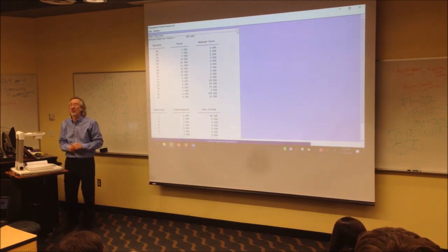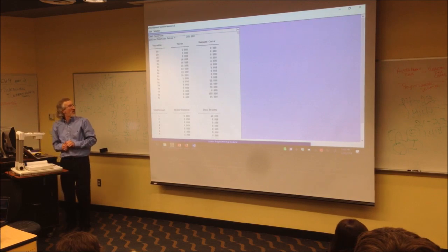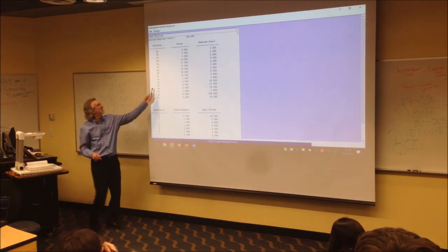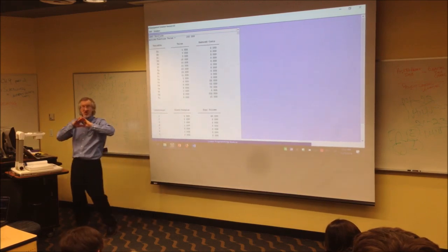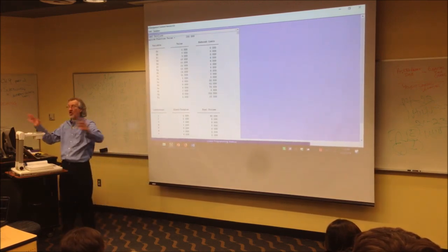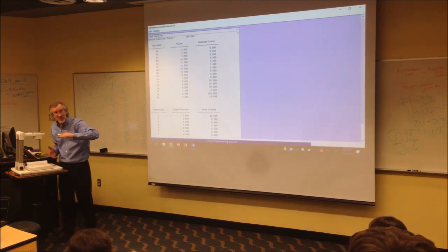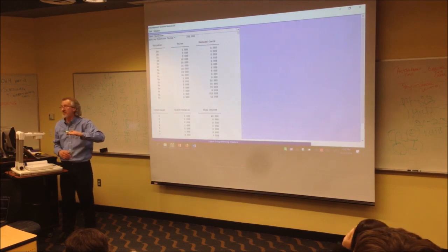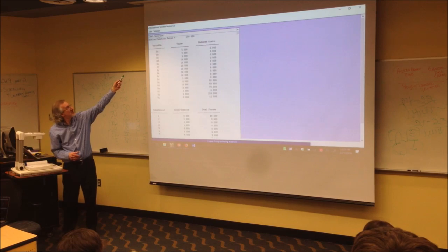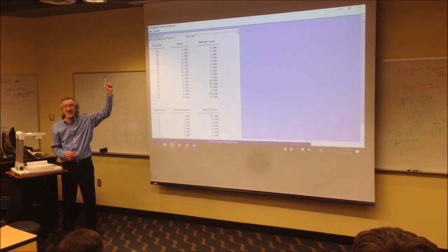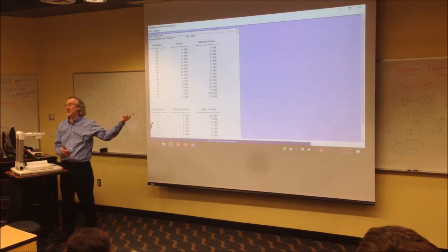And how much is A being crashed? We've got to get 4 units of time out. How much is A being crashed? 1 unit. How much is F being crashed? There it is. There's how you know, and there is no less expensive crashing cost, no matter what combination might exist. The least amount of money we have to spend to get these 4 units of time out of this project is how much money? $200,000. That's your objective function value, and that's the least we're going to have to spend to get it down to 26 weeks.